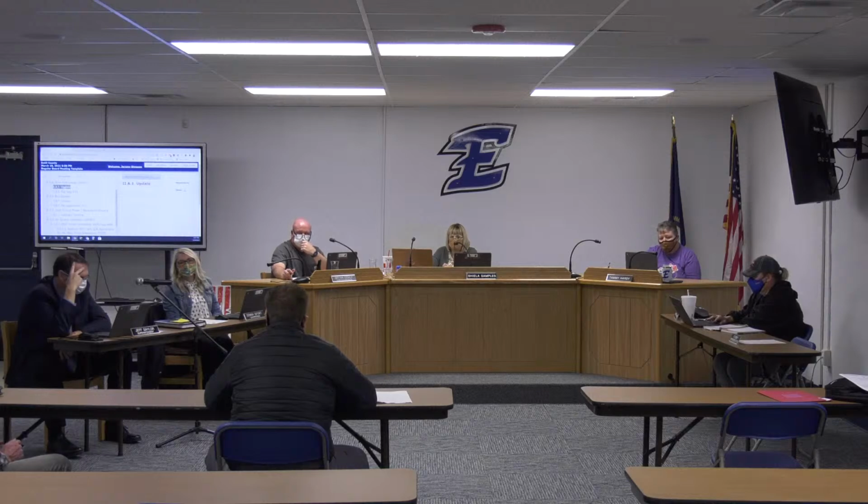Area A will pretty much wrap up painting and then drywall, and then we'll bring in the finishes, just like we did in Area B. Right now, our substantial completion date is 6/28, and our final completion date is 7/22, so it's 1 day before the opening ceremony.